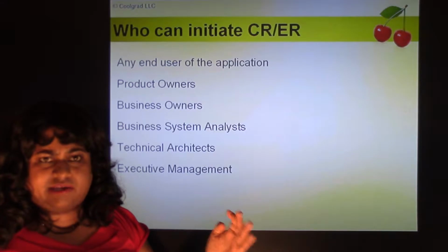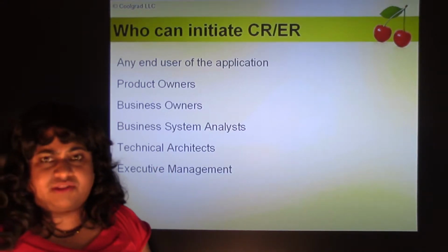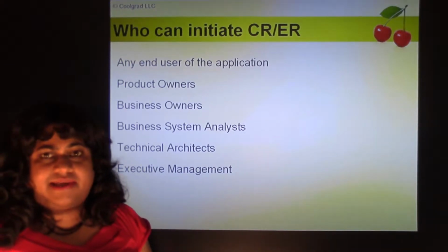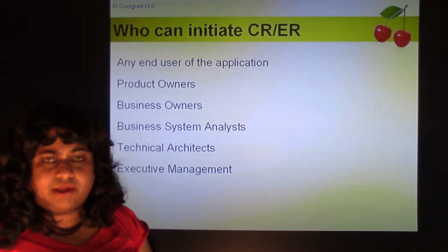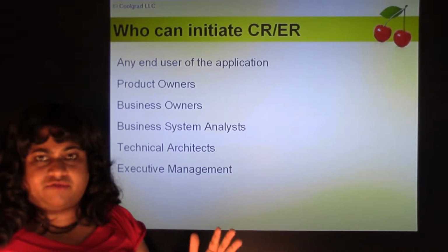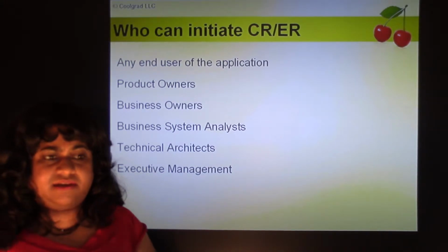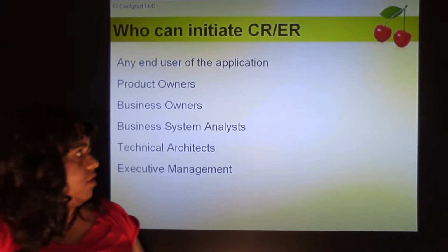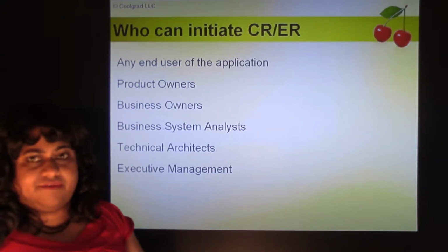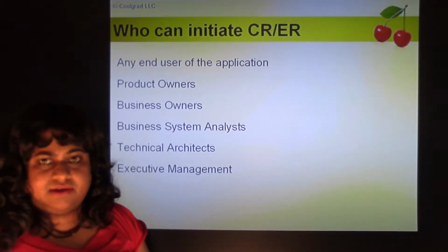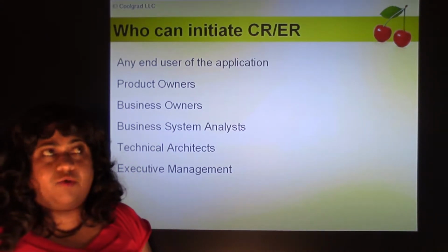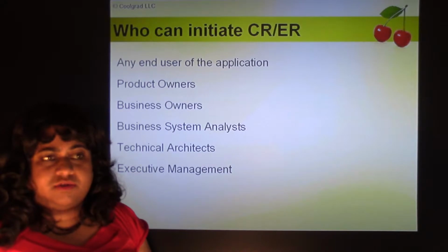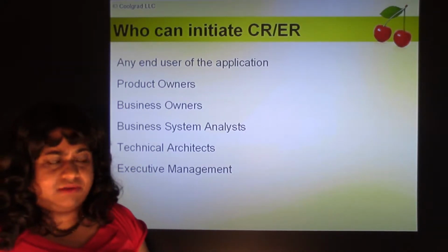So when you have a bunch of functionality and you release it, you put it to production, that's like a release. So let's say a particular module has gone live, like say the help desk module. That part of it is designed and everything is working fine, tested, the UAT, the user acceptance test is done, and the help desk module has gone live. So the other things are still in development. So after it has gone live, people start using it, and then they realize we should have done it differently, or we should add this new functionality. They come up with all these things after going live. It happens all the time. So it comes in as change requests and enhancement requests.